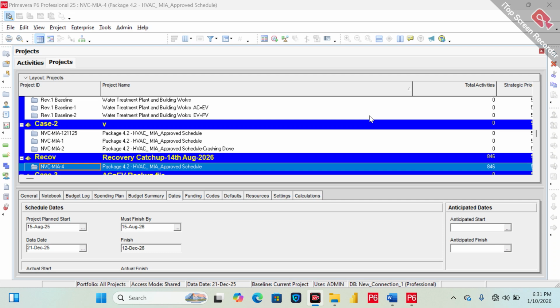A revise work program is needed when there is additional scope, or omission of scope, to your existing scope, or there is any amount of approved EOT, extension of time, or any variation orders. In that case, you have to prepare a revise work program.